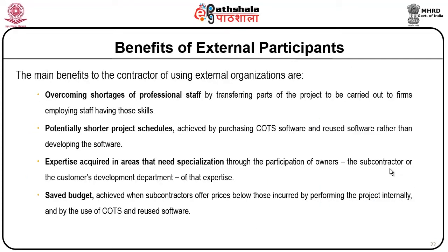Benefits of external participants. The main benefits to the contractor of using external organizations are overcoming shortages of professional staff by transferring parts of the project to be carried out to firms employing staff having those skills, and potentially shorter project schedules achieved by purchasing commercial off-the-shelf software and reused software rather than developing the software.